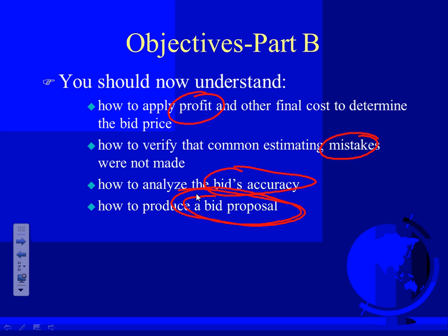When you look at the software, you need to be able to identify the right type that you're taking off. They take off by assembly, guys. The assemblies that we use in a commercial project will look something like this. We're using metallic boxes, metallic devices, mud rings. All these come as a whole assembly. So if you need to take off how many switches are there? 1, 2, 3, 4, 5 switches. You will take it as one assembly.